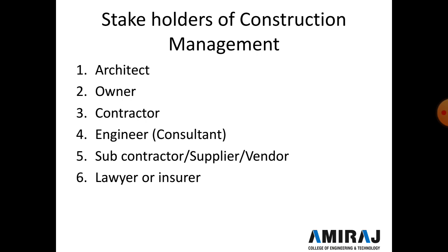The architects are traditionally responsible in both the pre-project and project phase, acting on the client's behalf. In the pre-project phase they prepare the drawings and tender documents, and select a contractor. And in the project phase they are responsible for checking the measurement, certification of bills, and overall project management functions. In the case of the public sector, a separate engineering department handles tender preparation and contractor selection.